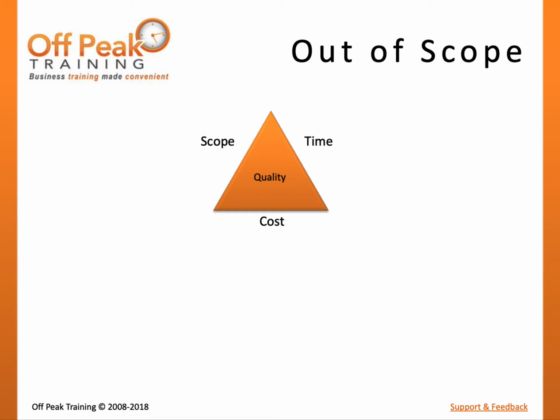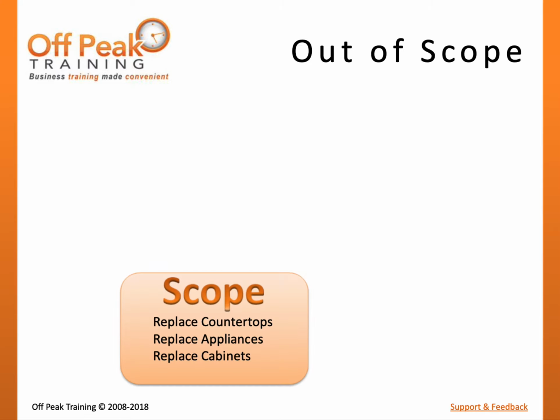Once the project plans have been defined and project execution has begun, it can be tempting for project stakeholders to want to add to or change the scope. This is okay when proper change control procedures are followed. However, without going through change control, this can lead to unforeseen and unplanned changes to schedule, costs, or other project objectives.